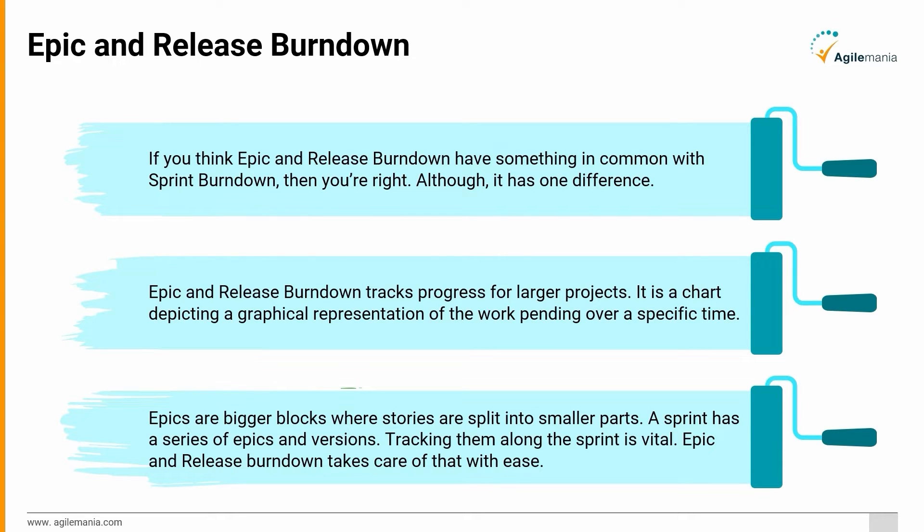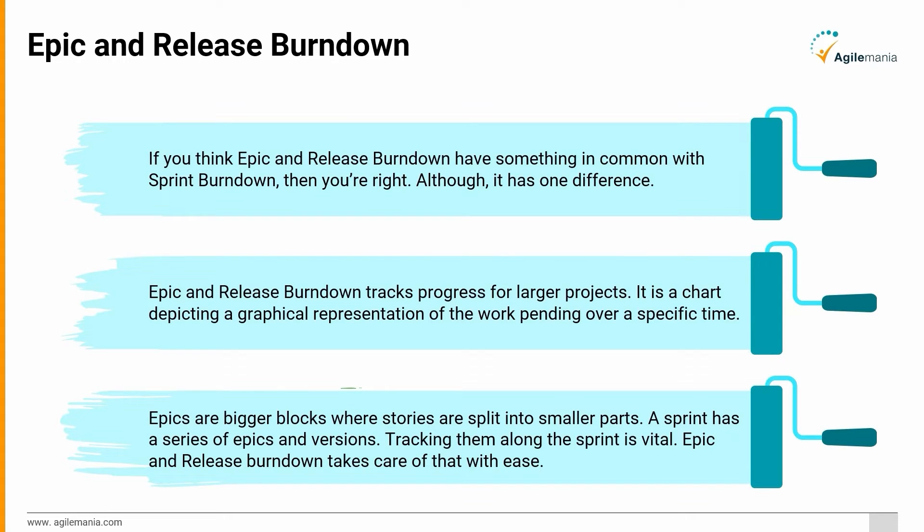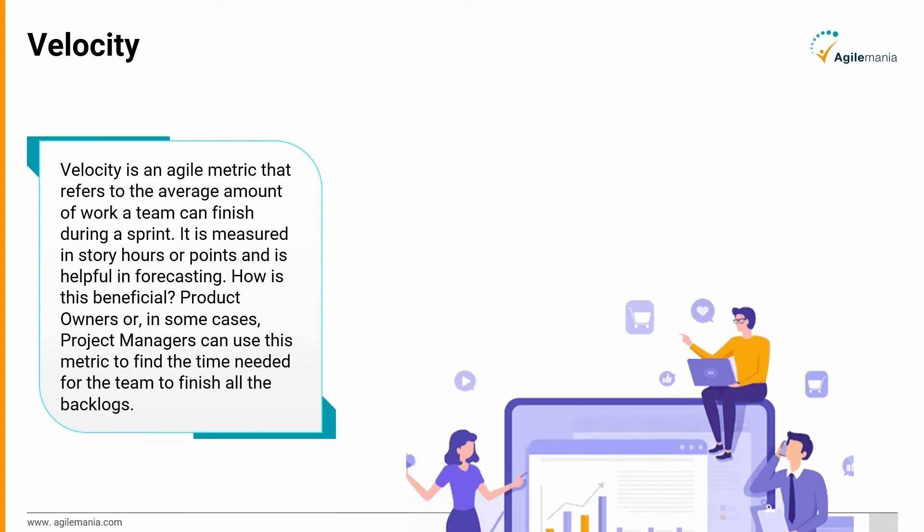Velocity: Velocity is an agile metric that refers to the average amount of work a team can finish during a sprint. It is measured in story hours or points and is helpful in forecasting. How is this beneficial? Product owners or, in some cases, project managers can use this metric to find the time needed for the team to finish all the backlogs.